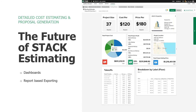We're introducing a key unit concept where these are numbers you're probably using in your business right now — to just kind of find and make sure your estimate feels right. You've got a project size, and I can say — for example, if I'm doing roofing and this is a giant 37-square roof — what is my cost per square? What is my price per square? All customizable. If you're a concrete guy and you want to look at cost per cubic yard, price per cubic yard, or even profit per cubic yard, we want to let you do that and have that at a glance, giving you some handles to move things up and down.